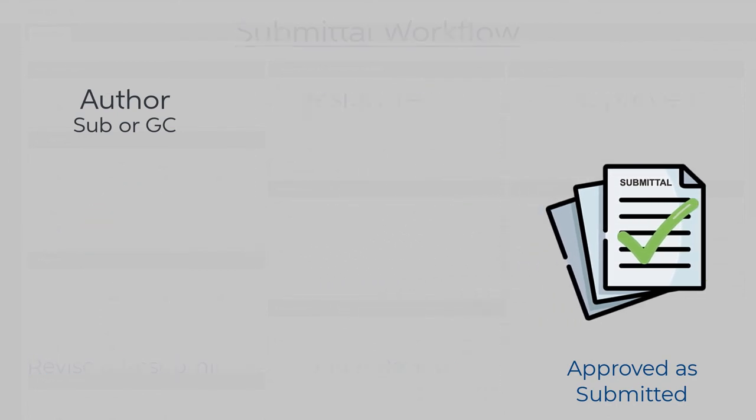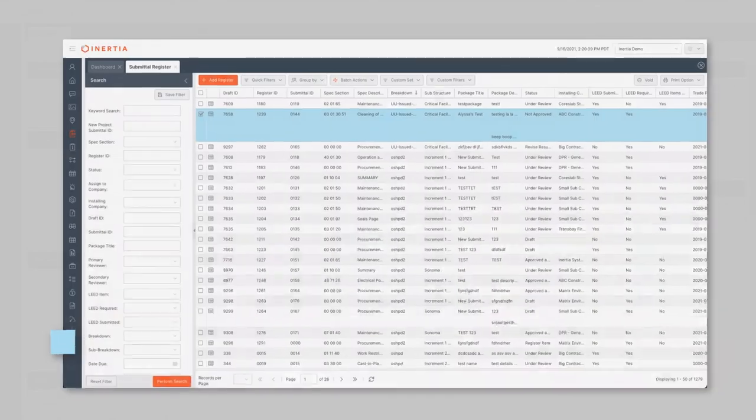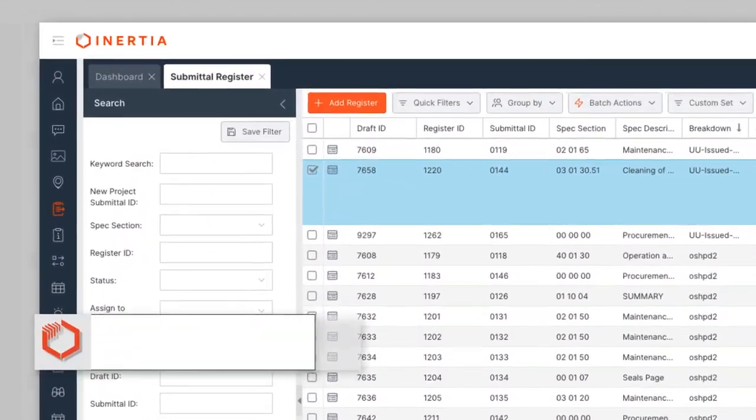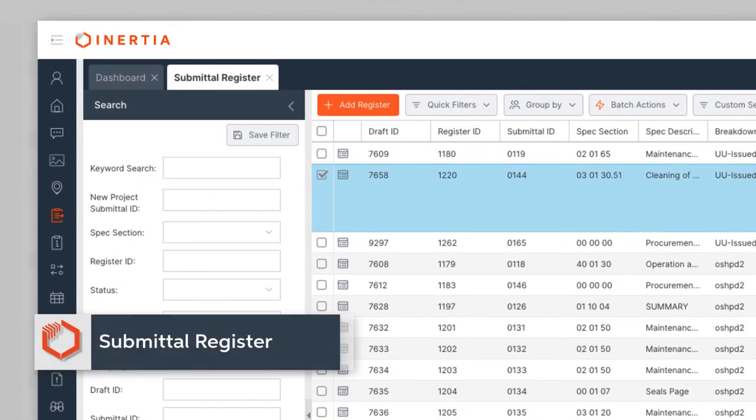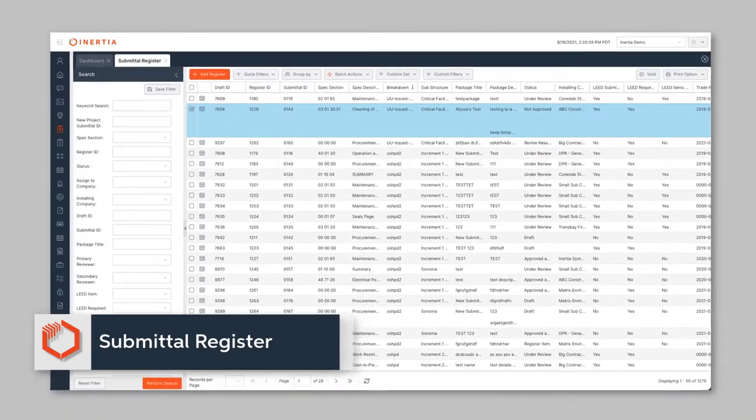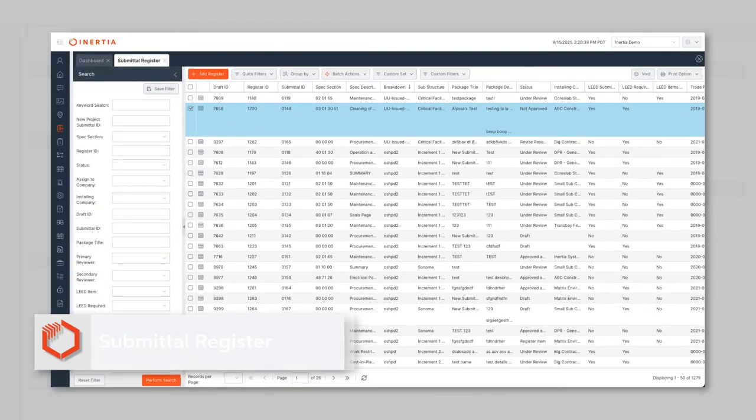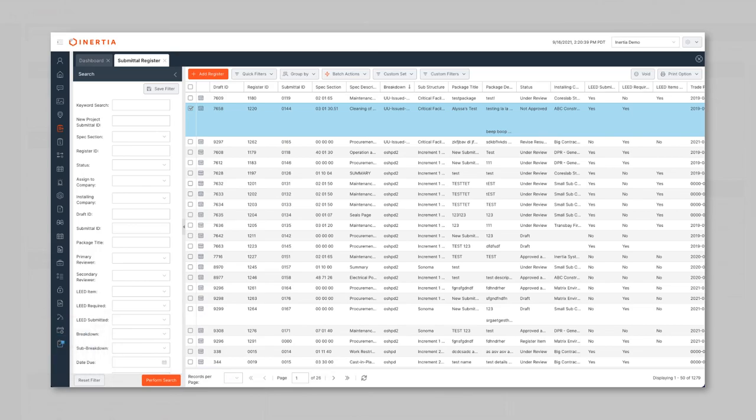In Inertia, the draft mode of the submittal is the submittal register. A general contractor or subcontractor can at any time create a new register item where it stays in draft mode until it's time to submit to the design team.